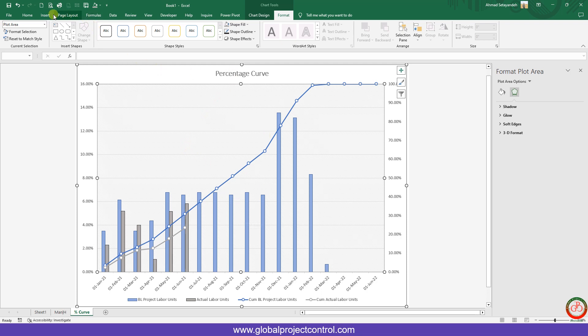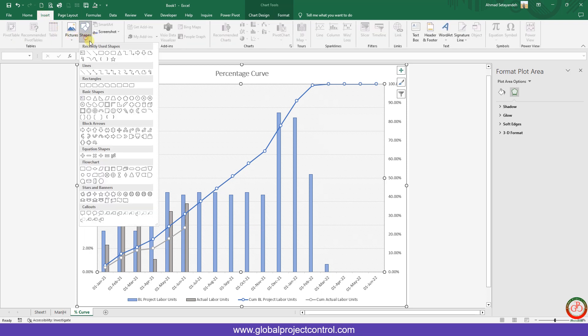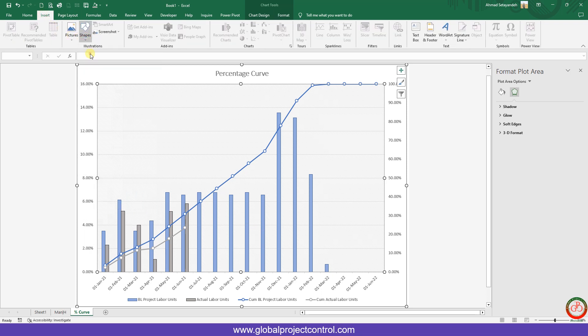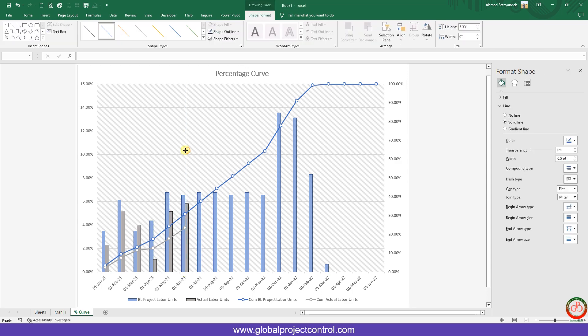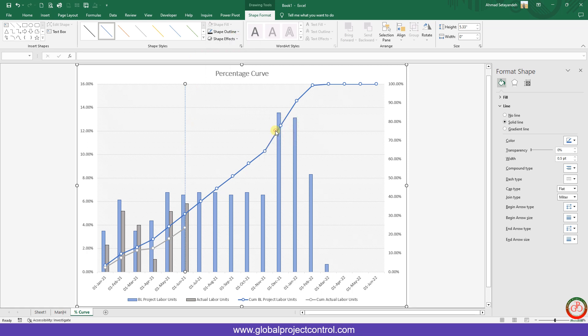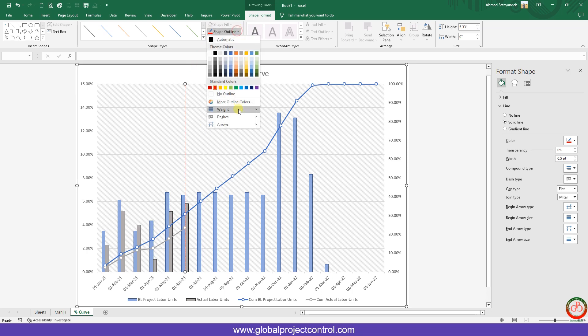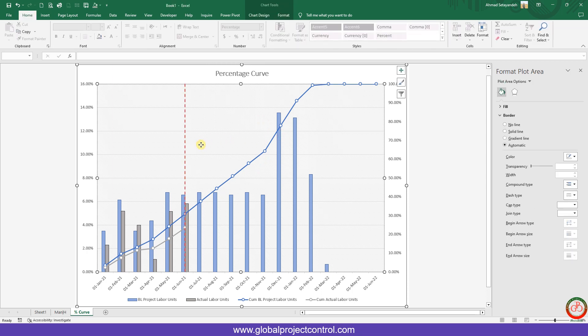You should add data for the S-curve. Usually we need to know what is our data date, so I added data date here like this. Then it is better to make it like a dash line, change the color to red, and make it more visible like this.